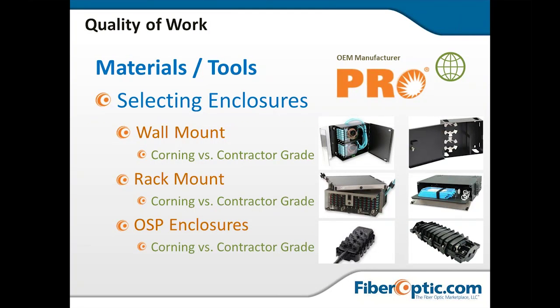But you're going to get the performance when it comes to speed in the field. These boxes may be a couple $100, but if you have a 2 or 3 man crew doing installation, and your labor rate is significant enough, that labor rate and the extra time it's going to take is easily going to outweigh the cost of the material.